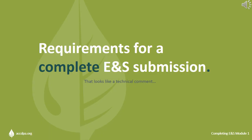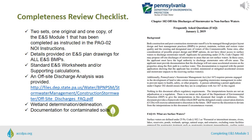I will use the remainder of this presentation to briefly go over additional requirements for a complete ENS submission. At times we get remarks that our completeness comments seem more like technical comments, and this might be true because much of the information overlaps. We will be requesting complete or correct information during completeness review so that we have the right information to assess during the technical review. Signed copies of ENS Module 1 must be submitted and completed as dictated in the NOI instructions. We will also be verifying that details are provided on the plan drawings for each and every ENS BMP proposed.